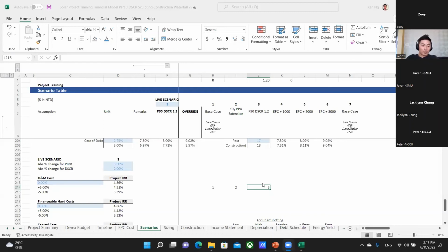So this is a bit of a judgment call, but as you can see, once we achieve land conversion, we're at 8%, because once you've achieved land conversion, there are no more high-risk milestones like permitting approvals that you need to get. So as a result, there's a big drop from getting EP to land conversion. It's a big 2% drop here.